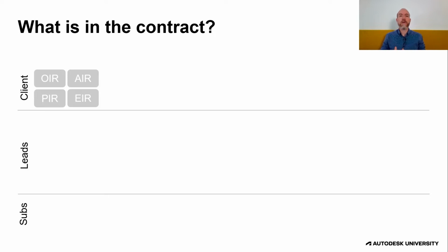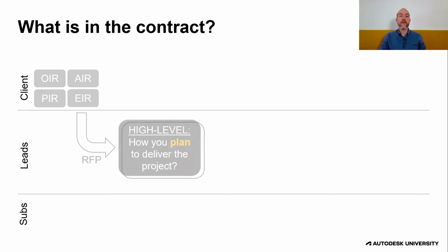Well, that's the problem. Traditionally BIM hasn't necessarily had all these digital deliverables defined up front. This is part of what the ISO standard is trying to achieve. It says you have to issue these documents as part of the RFP going out to different bidders. So if somebody is bidding to design your building or to construct it, they need to know about this information up front and have it as part of the RFP.